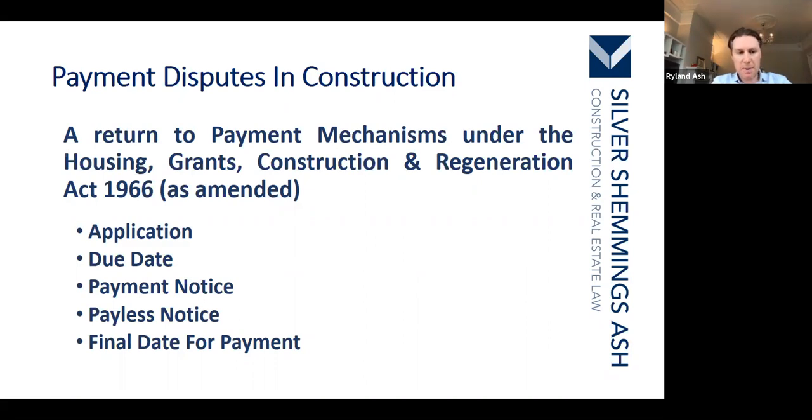The due date I've explained. Payment notice, the Construction Act is very specific about this. It says you must issue this notice no later than 5 days after the due date. And in some contracts, particularly ones that parties have created or drafted themselves, I've seen provisions that allow for the issuing of a payment notice prior to the due date. I think that that's fine.